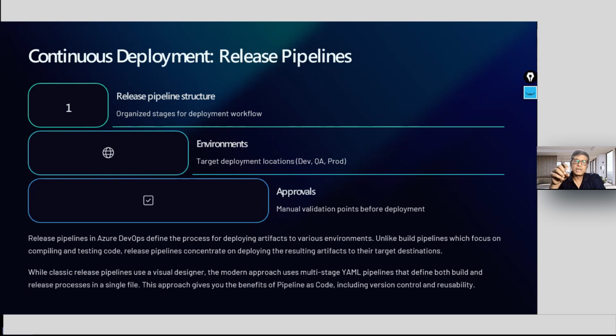And also you will say that on these trigger points or on these conditions, I would need to get an approval before I do this. For each exit gate, meaning from this phase to that phase, I would need an approval from my project manager or from the client or from the test manager, all these things, manual validation. So you will send a mail, and unless and until that mail comes as an approval, you will not move into the next stage.